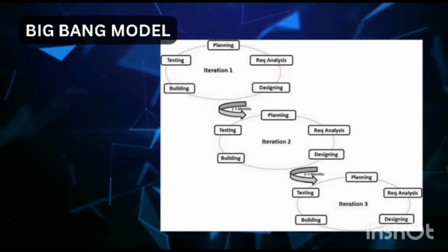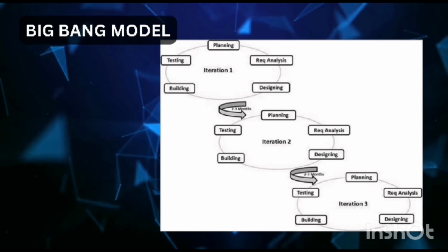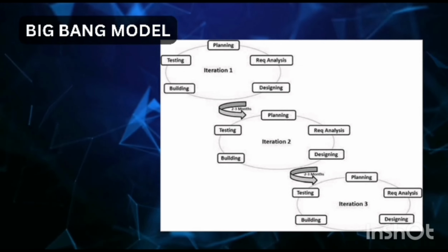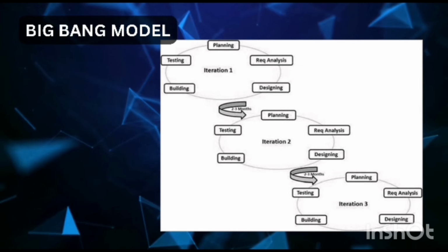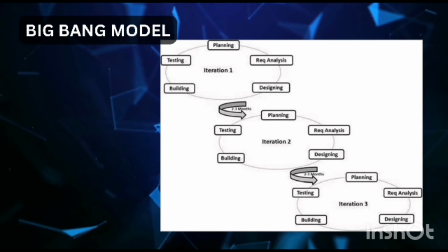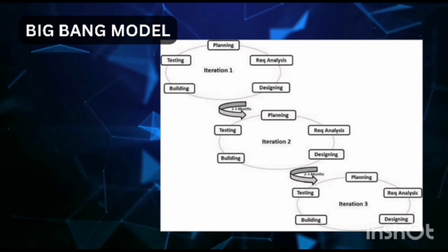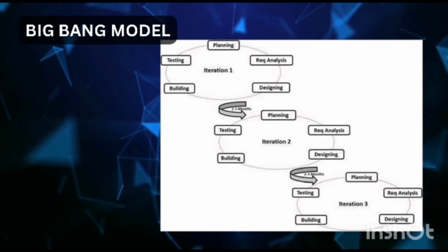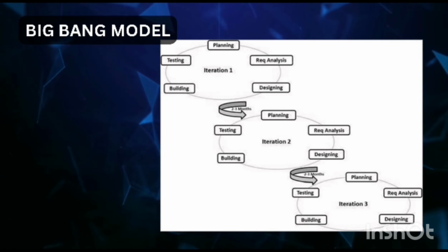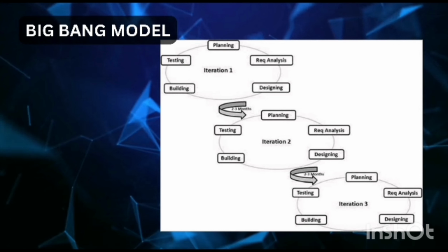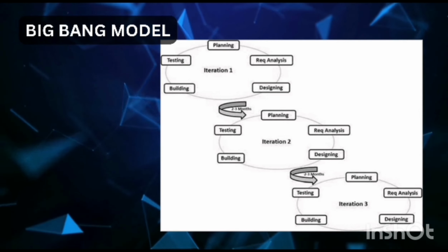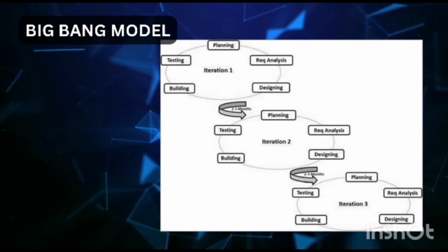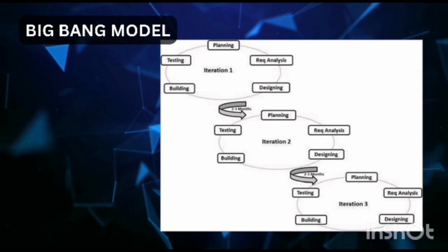And now the last model is the Big Bang model. The Big Bang model is an SDLC model where we do not follow any specific process. The development just starts with the required money and efforts as the input, and the output is the software developed, which may or may not be as per the customer's requirement. This Big Bang model does not follow a process and there is very little planning required. Even the customer is not sure about what exactly he wants and the requirements are implemented on the fly without much analysis. Usually this model is followed for small projects where the development teams are very small.